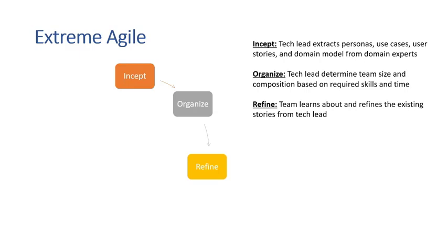And now the team can comprehend what the goal is that the tech lead and the architect have devised for the team. So the team goes about refining that, inspecting it, looking. Maybe we need to rewrite some of the stories so they make a bit more sense, or we can add some technical tasks to some of the stories, and clearly define the acceptance criteria for when we know a story is accomplished, and think about the workflow.